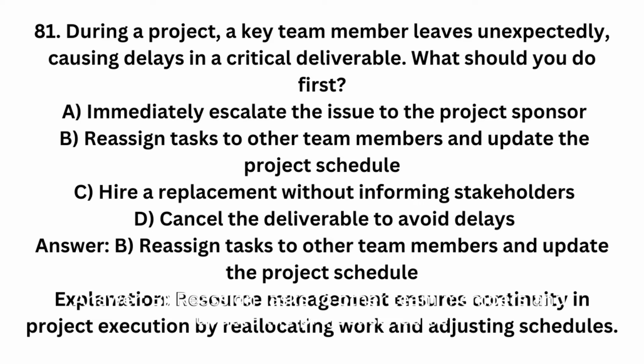Answer: B. Reassign tasks to other team members and update the project schedule. Explanation: resource management ensures continuity in project execution by reallocating work and adjusting schedules.